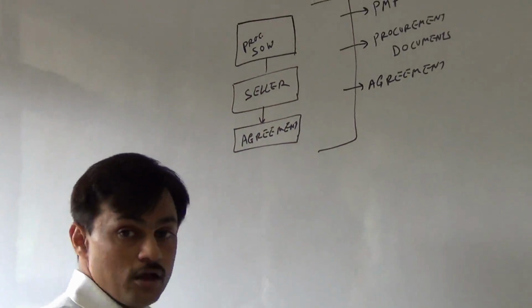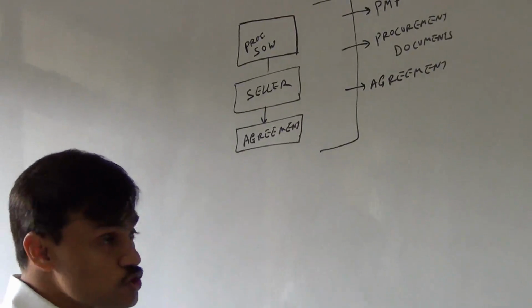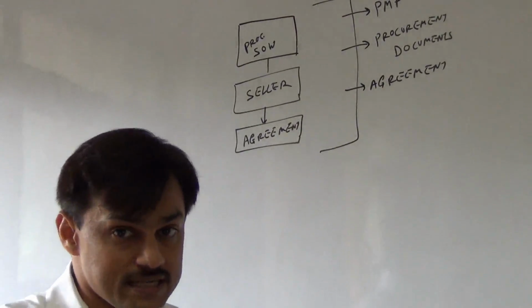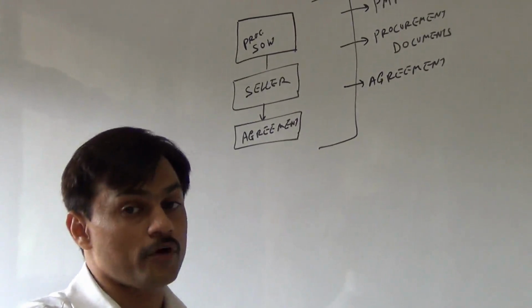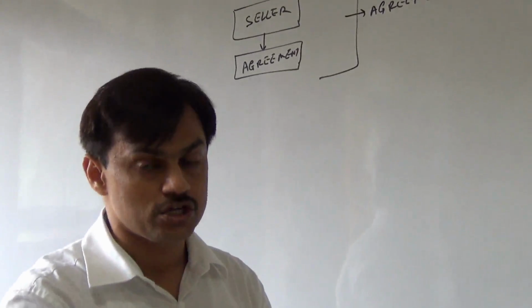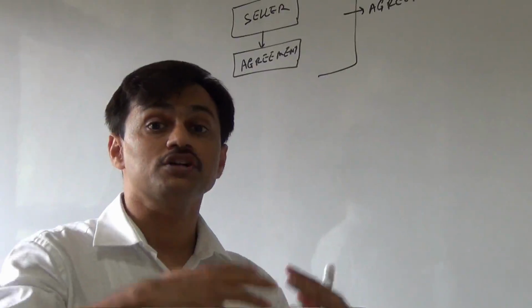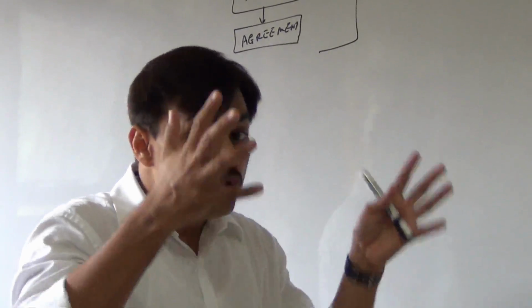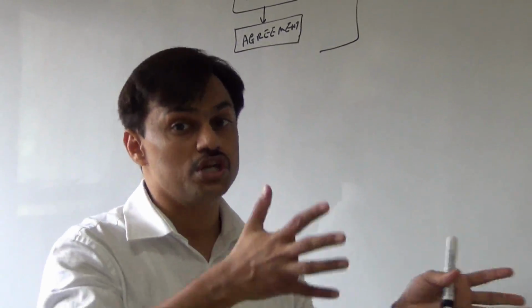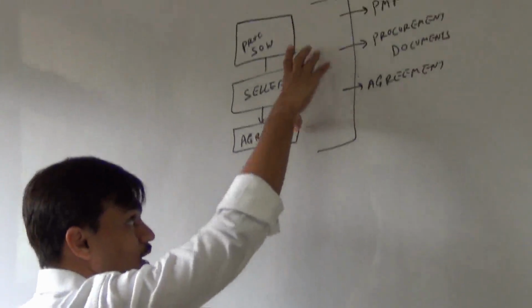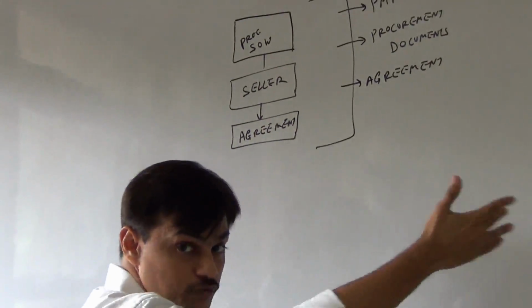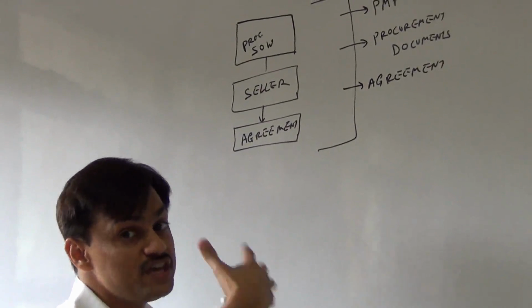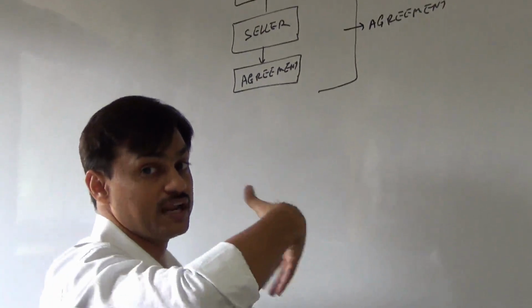What else? Since control procurement is an iterative process, while executing it, we may have agreed on changing some of the terms, some of the processes. So we also need to look into approved change requests, because we started with a plan and while executing that plan, we may have some approved deviations or some approved preventive or corrective actions.